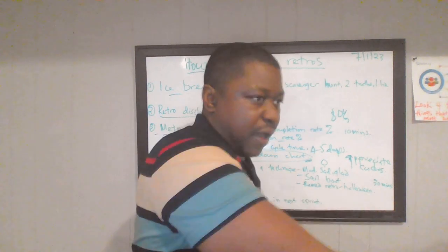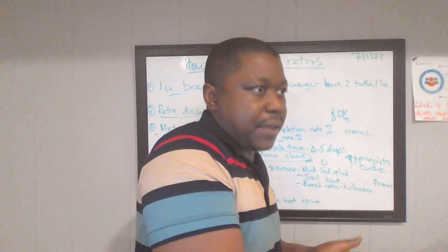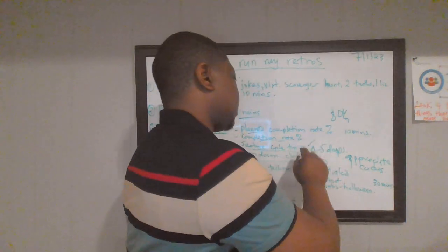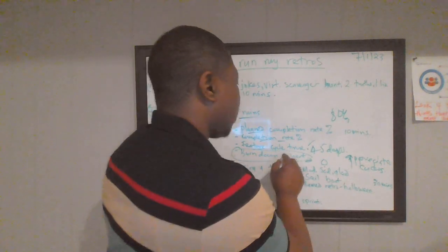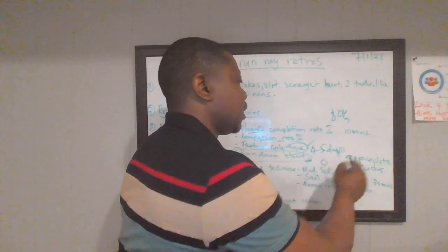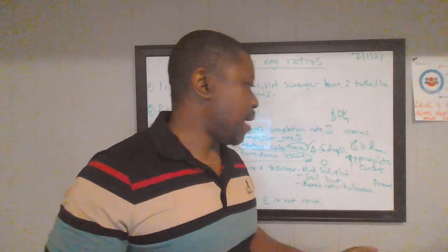But we are on the 45-day mark of this particular epic, or on the 30th day to complete this epic. And I also look at feature days as well. Then for those completed during that sprint, I look at the cycle time and say, hey, we had to complete this feature within 45 days, but we actually completed it in 60 days. Why? Did we size it wrong? Or was it too large? How could we have ssliced it better such that we're able to complete it within 45 days max?